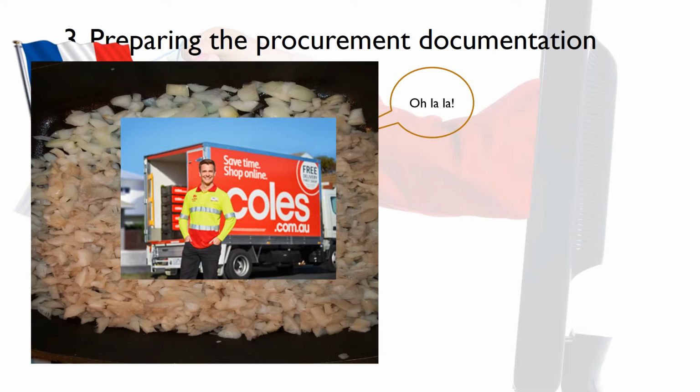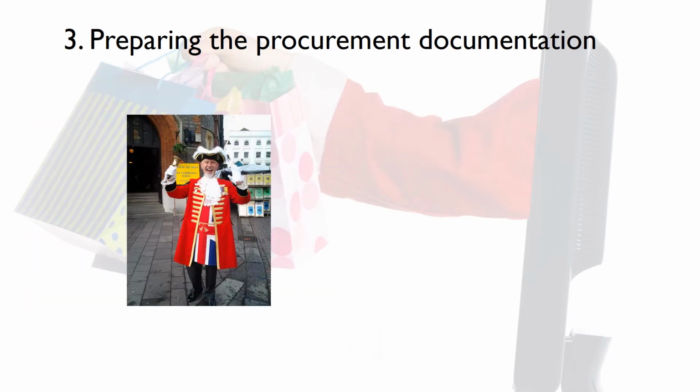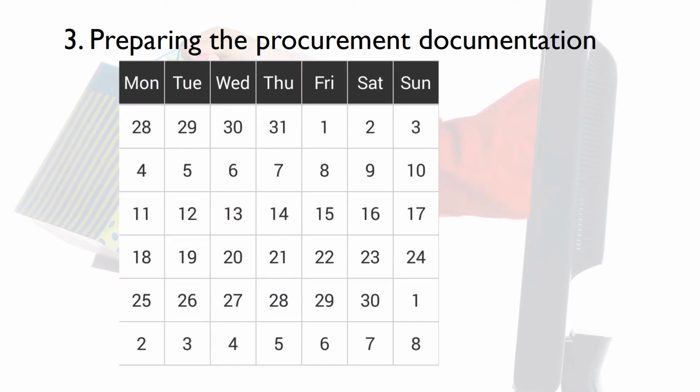All this information about the work to be done or the materials to be supplied needs to be documented so that you get exactly what you want from contractors and so that contractors sending you bids are pricing their work with the same information. That way no one has an unfair advantage. You also need to consider how you will send the documentation out and when you want the tenders back from interested contractors. Plus, the contractors need instructions on where to send their tenders to.